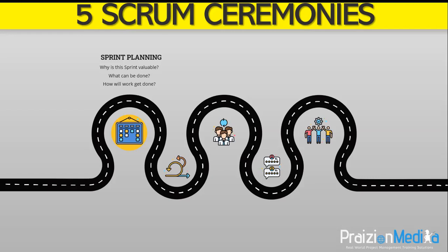The sprint goal that communicates why the sprint is valuable to stakeholders also needs to be discussed. The sprint goal must be finalized prior to the end of sprint planning.